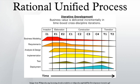Elaboration Phase: The primary objective is to mitigate the key risk items identified by analysis up to the end of this phase. This is where the project starts to take shape, with problem domain analysis performed and the architecture taking its basic form. The outcome includes: a use case model at least 80% complete, a description of the software architecture, an executable architecture realizing architecturally significant use cases, a revised business case and risk list, and a development plan for the overall project.